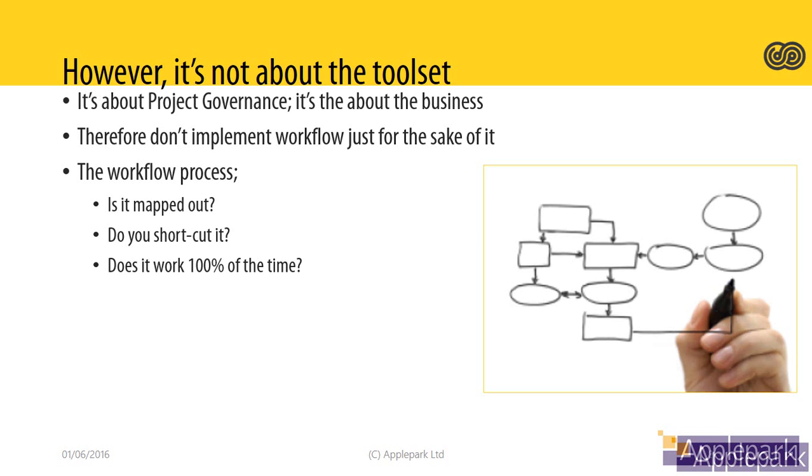The successful implementations with workflow that I've been involved with, the customer has already had a paper-based workflow that they've utilized over the last year or 2 years. They've got that slick and they know the glitches in it, and then you can of course begin to automate something like that.